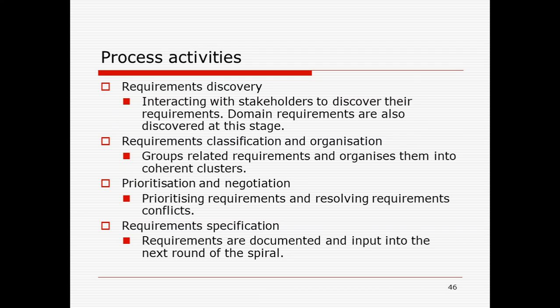After that, prioritization and negotiation. So prioritizing the requirements and resolving the requirement conflicts. The technical person may identify some requirements to be more important than other requirements. In that case, priority has to be set for those requirements, so that these requirements are met before the other requirements.